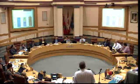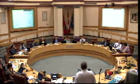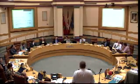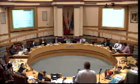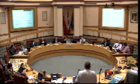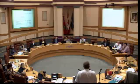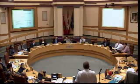So where are we at? The financials: we have spent at the end of May, I've written checks for just over $8 million, 40% of the budget. We have funded to date $3.5 million in DCs that we have collected towards this project. I have no land sales, although there was one during June, a small one. And so the balance of that is through the construction line of credit.